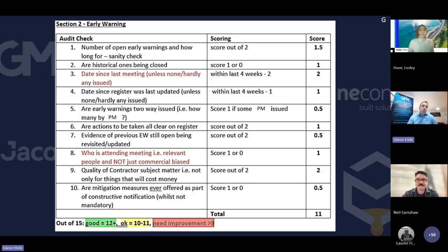So yeah, it is talk, and NEC can only go so far. It's not absolutely foolproof. It puts as many measures in place as you can if someone's not doing something, but that is one. Yeah, at least you've got that clause you can refer to. You can remind them under clause 13.4. Come on, you've got to let us know in enough detail what's wrong with it. That's particularly relevant when it comes to design. If you don't accept a design because it doesn't comply with the scope, well, give us a clue. There's so many documents in scope. What do you think it doesn't comply with?